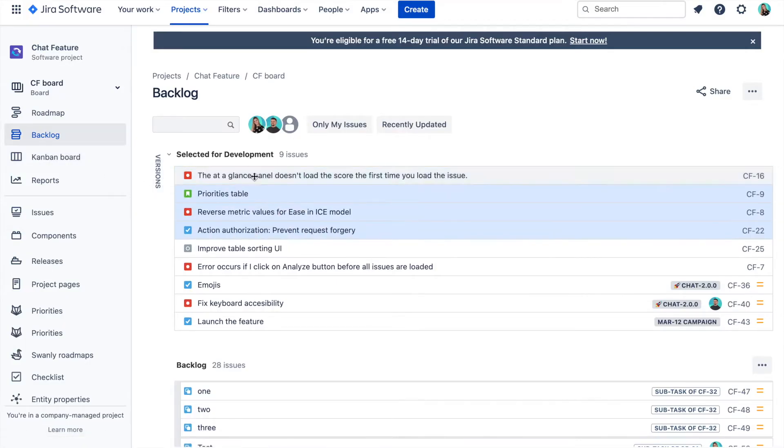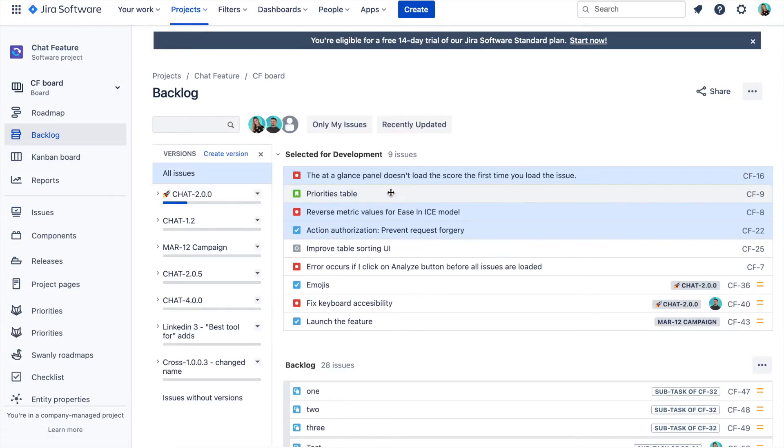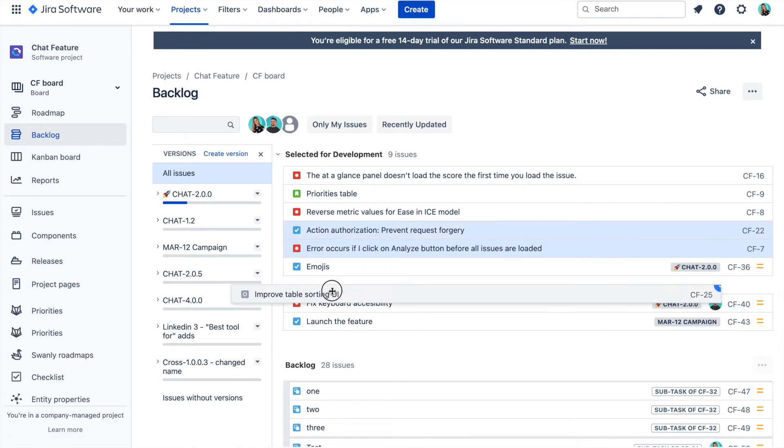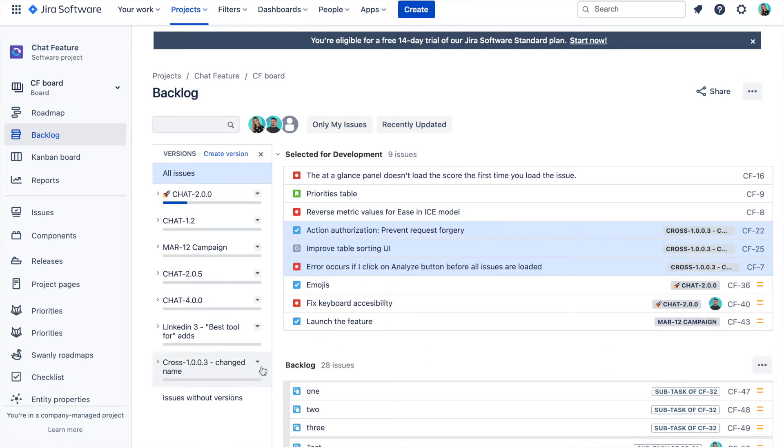And if you are using backlog functionality in Jira, you can also assign issues to the release in bulk from here. Just drag and drop issues over to the release and you have it. So this is how Swanly allows you to synchronize releases across Jira projects.